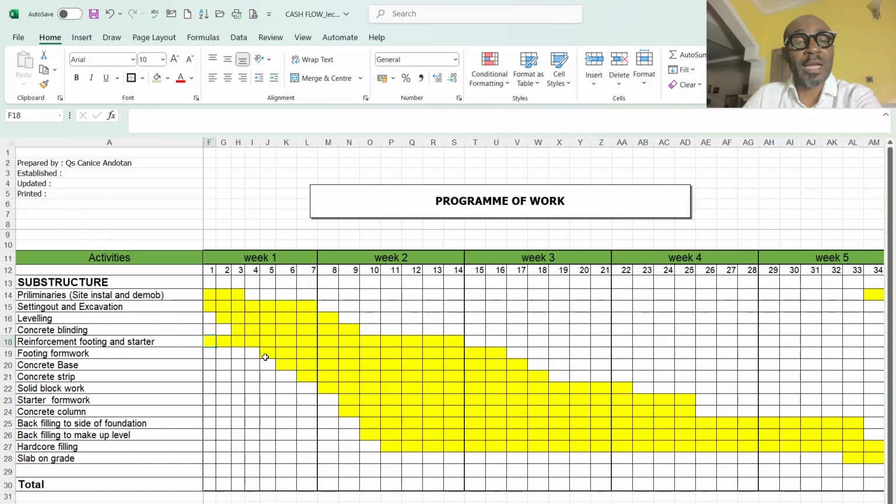So you see, I have the planning with time lags of 1 day intervals. Even though most of the jobs are start to start, they have to have a day interval so that the activities will commence even though the previous one is not concluded. Then there will be space for the next activities to commence in that location.